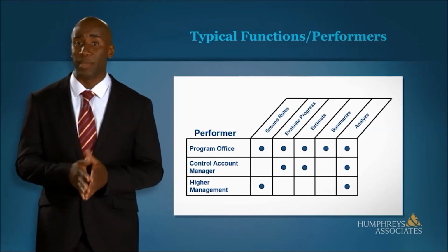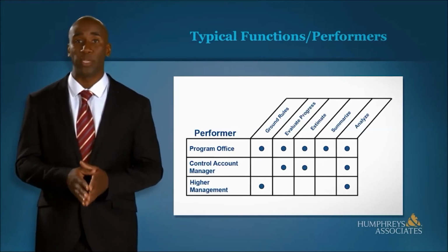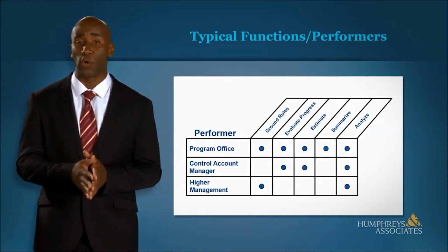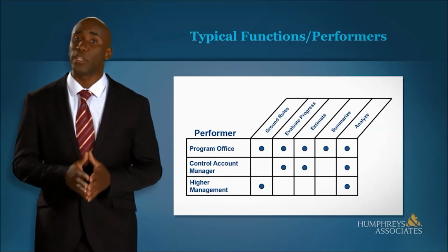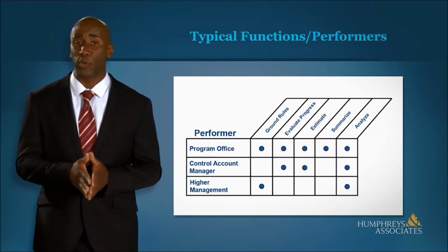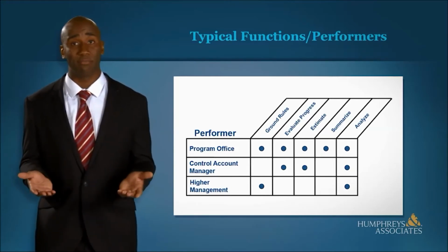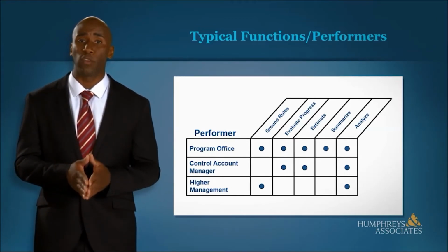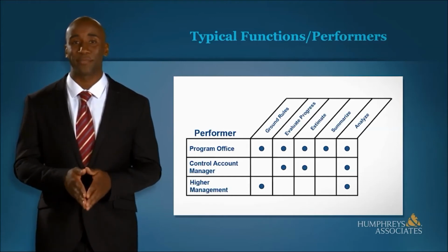Then, other factors need to be considered, such as what rates will be used. Will a fiscal year boundary be crossed because of the schedule forecast dates? If the rates are going to change, how much for increased salaries? 2%? 6%? Changes in rates will be a part of the rationale for the EAC change.